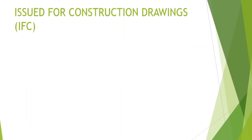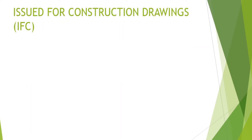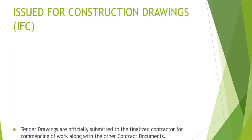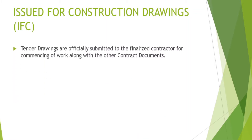Once the contractor is finalized, the tender drawings basically evolve into IFC drawings, or Issued for Construction drawings. These drawings form part of the contract document submitted to the contractor from the client or consultant side, and works at site commence utilizing these drawings.